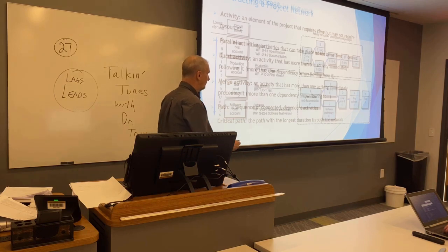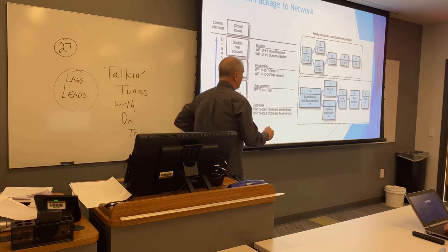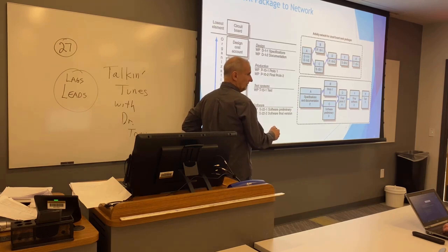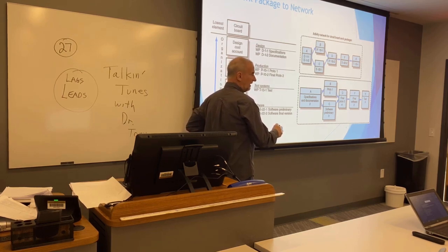So let's just do it for fun. Let's say that each one of these is 1 day, except this is 2 days. So how long is path ABDFK? How many days? 5 days. What about this one? This is 2 days. What's this path? Shout it out.